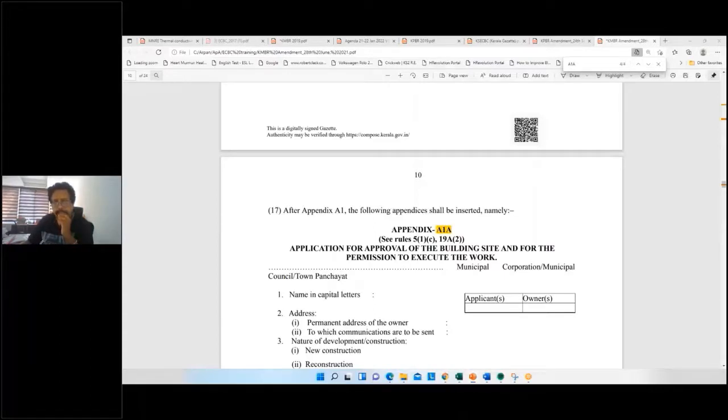Second point, regarding whether the official in local government will identify if the building has a connected load of 100 kilowatt or more, or 120 kVA or more, or 500 square meter conditioned area or more: this will not be identified at the local government level at the point of application. But at the completion point, we again have the enforcement activities, wherein the electrical inspectorate will be checking the connected load and these two parameters, that is the 120 kVA and the 100 kilowatt. This will be checked and verified by the electrical inspectorate. Unless they accept the SLD provided at the electrical inspectorate, the completion certificate will not be issued by the local government. This is how the enforcement is coming into effect. Thank you.